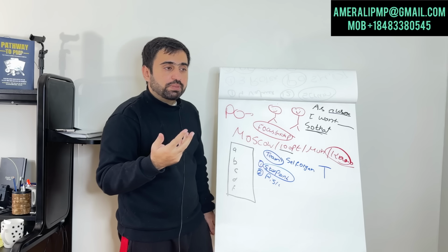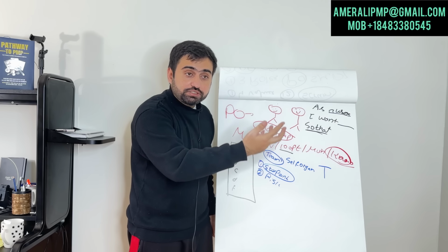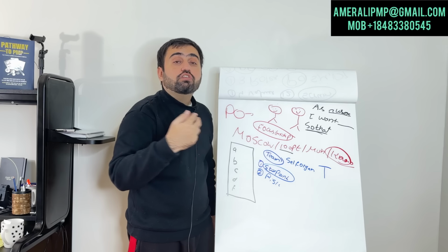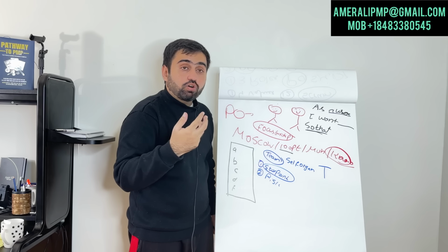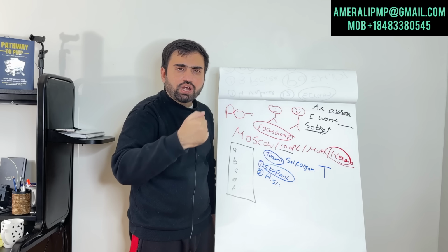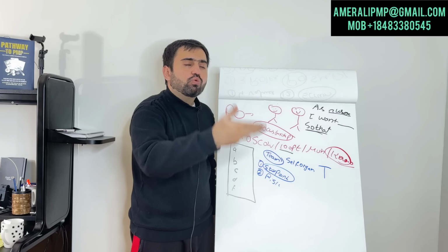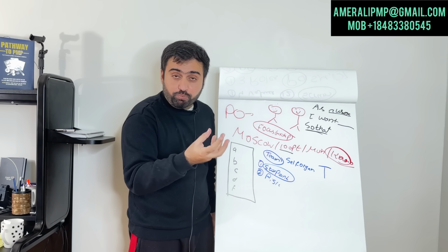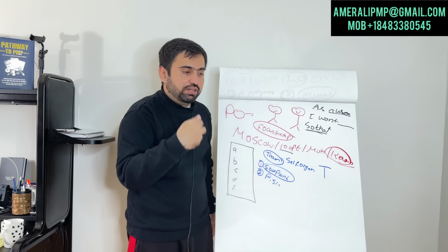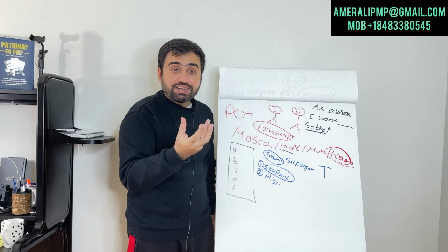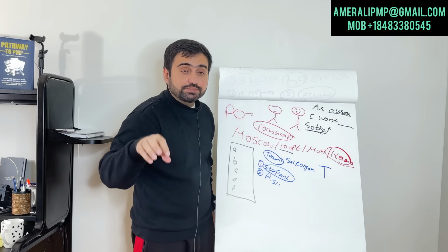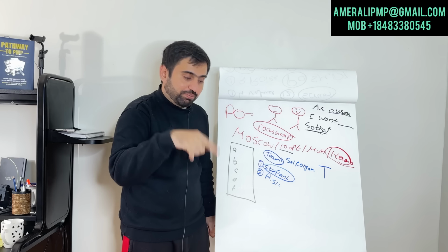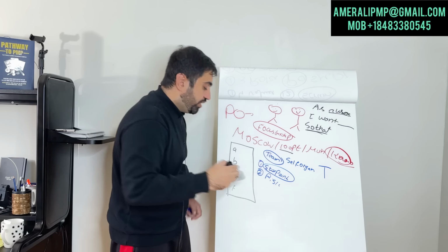We can use ideal days, that is how many days it will take, affinity estimation, this is small, medium, large, or the Fibonacci series, based on the Fibonacci mathematical series 1, 2, 3, 5, whatever the story point is. We get consensus through planning poker, or if the people are not agreeing, maybe through Wideband Delphi, anonymous consensus building. We get the story point, the effort required to complete each user story on the product backlog.